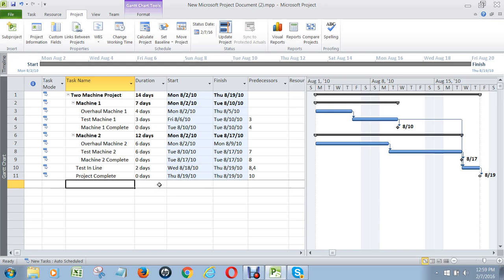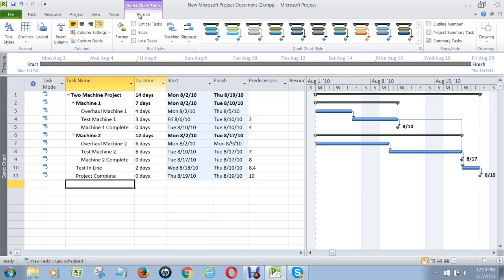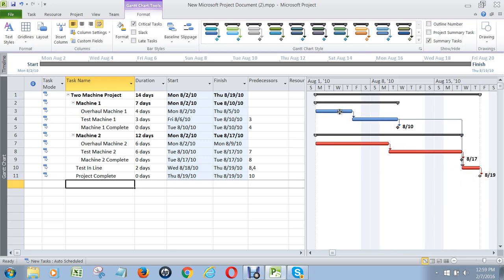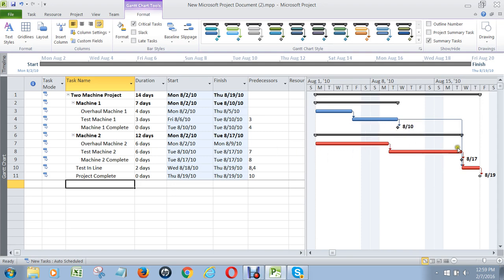But I'm still not done yet because I need to know what the critical path is. So I go to the Format tab and click on Critical Tasks. What that does is it puts in red the longest path — this is the path that if any tasks on it are late, then the whole project will be late. Tasks not on this path are non-critical, meaning if they're late they still won't delay the whole project because there's slack here. If these tasks are delayed, it won't delay the whole project. But if any of these three are delayed, it will delay the whole project. That's the critical path — now we know what's most important to manage.